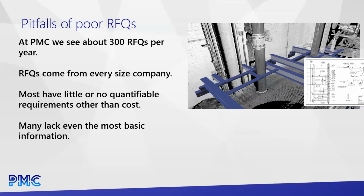What kind of settings we need to run on the equipment. Is mobile equipment a viable solution? Is it not? Mobile equipment can cut the price of these jobs about in half, but you sacrifice some quality to get there. Can we use photogrammetry, especially for outside work? What kind of accuracy do you need on the roof? All these types of things.